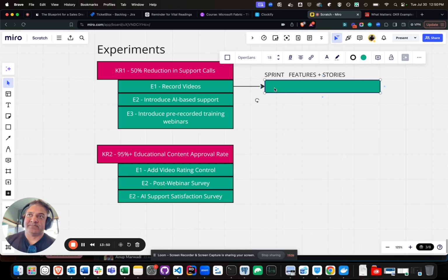record, do a Loom recording of the video, do transcription, make sure that you have a nice setup for the video recording. So you can see how every feature can be broken down into smaller stories, which can be delivered by one or more members of the team.